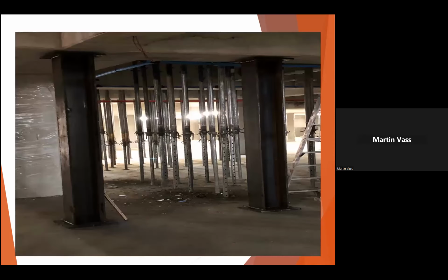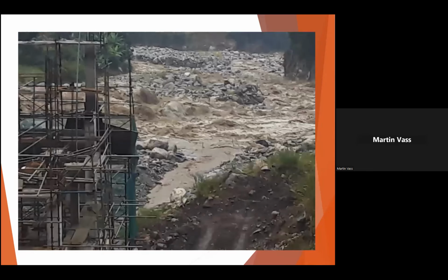Please ask questions as we go. Okay, so this was a twofold one. Here, the broker failed to reinsure. Then they took out the new policy, and we had a second flood. And on the second flood, the contractor failed to do the upgraded temporary works, and the claim was rejected. So this really was almost like a comedy of errors on this particular matter. First, there was no insurance, and second, the contractor failed to do what he was told to do by the second insurer.